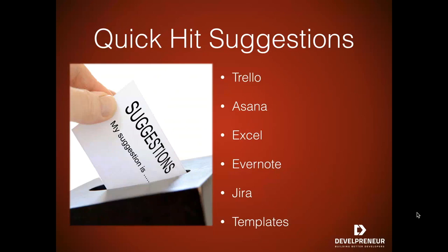And Asana is the same way, as they both work on essentially a Kanban board from the Agile approach, where you've got a backlog, you've got something you're working on, and you've got things that have been done. The nice thing about them is you can create a ticket with a few words, maybe a sentence or two. You can add more information. You can put estimates to it. You can assign a user to it, which is great if you've got a two or three developer team. You can move stuff around.